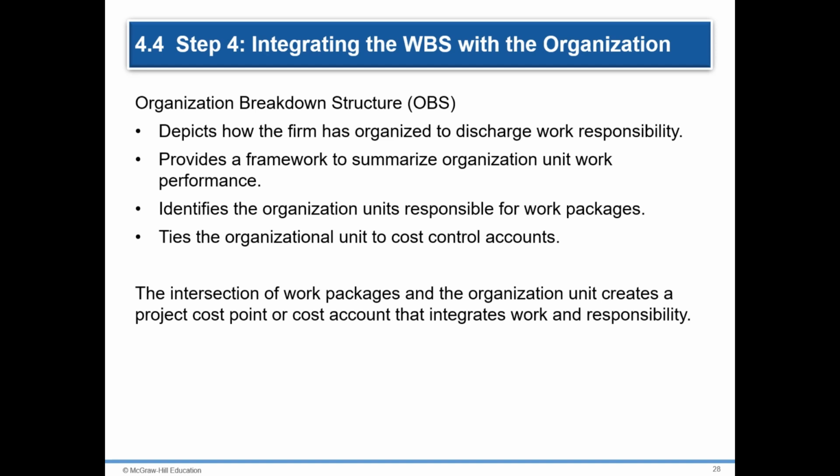The WBS is used to link the organizational unit responsible for performing the work. In practice, the outcome of the process is the organization breakdown structure. This OBS depicts how the firm has organized to discharge work responsibility. The purposes of the OBS are to provide a framework to summarize organization unit work performance, identify the organization unit responsible for each work package, and tie the organizational unit to cost control accounts.